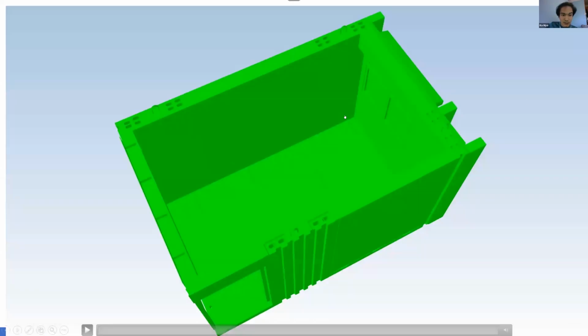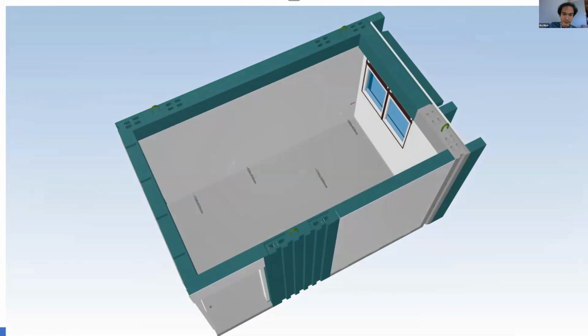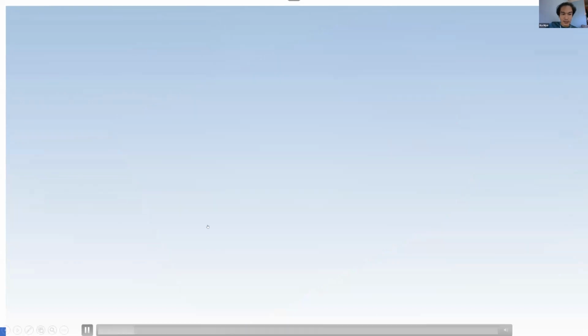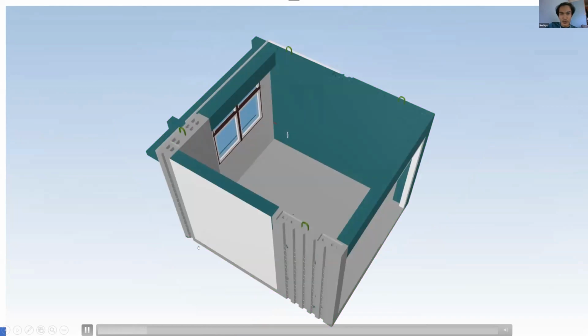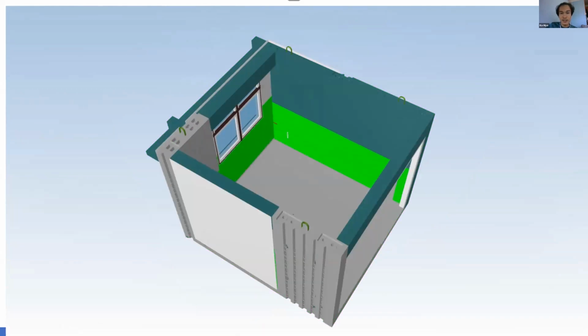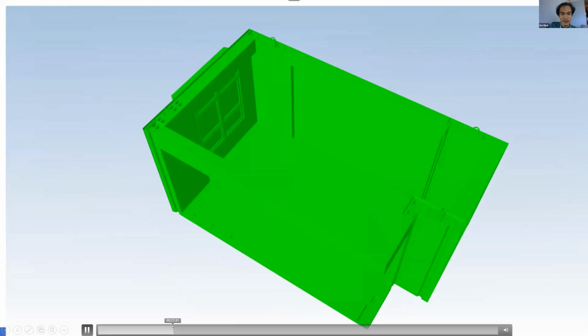So this is a PNGC file, I think the C26 PNGC file, showing how Synchro is used for construction simulation. So the PVC model for IPS, right? We were doing screeding. Because depending on the different module, we may need to do different activities. This one is at level, so we just do screeding on site. Yeah, at the factory that way.